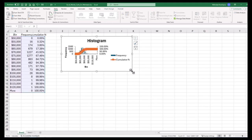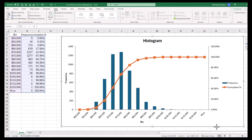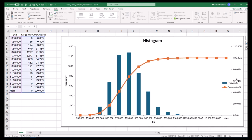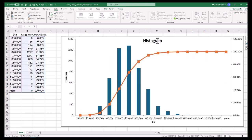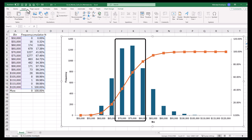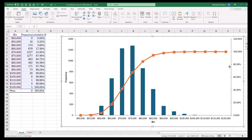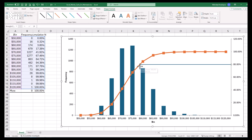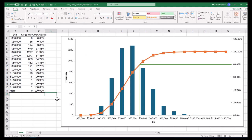You can adjust the chart size by dragging a corner while holding the Shift key. Remove any unwanted elements to make the chart ready for your project risk report. Visual inspection of the histogram's hump shows the most probable range of project cost scenarios. It is possible to find different p-values by drawing two perpendicular lines as demonstrated for P80. This concludes step three.